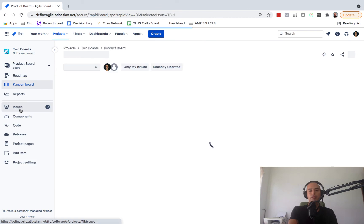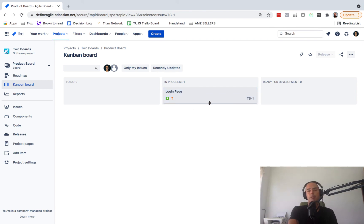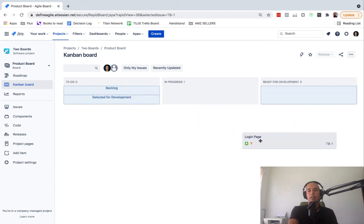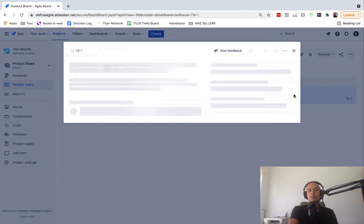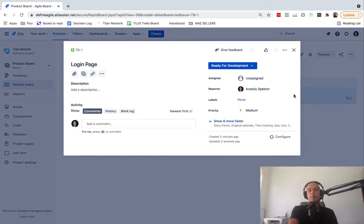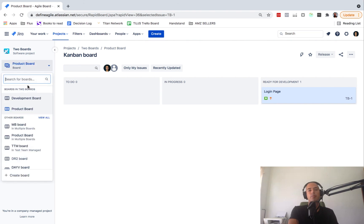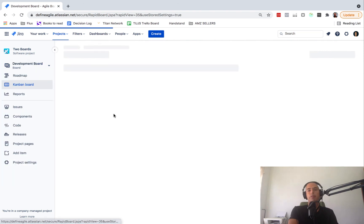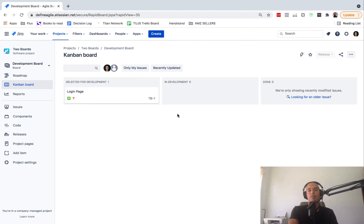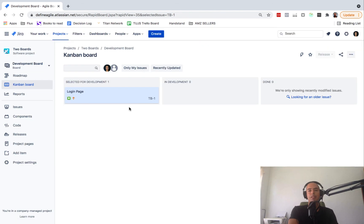Hopefully it's not too confusing. You can rewatch a couple of times but it's pretty straightforward. Essentially we are matching statuses. Whenever this Login Page will get in the same status as other board, it will appear on both boards. So if I move Login Page into Ready for Development, the status of this ticket will become Ready for Development automatically. Because whenever you move to a column, if it's only one status, it will assign that status. So then if we move to a development board, because we have the same status Ready for Development, it appears for developers. So developers can pick it up and move to In Development.